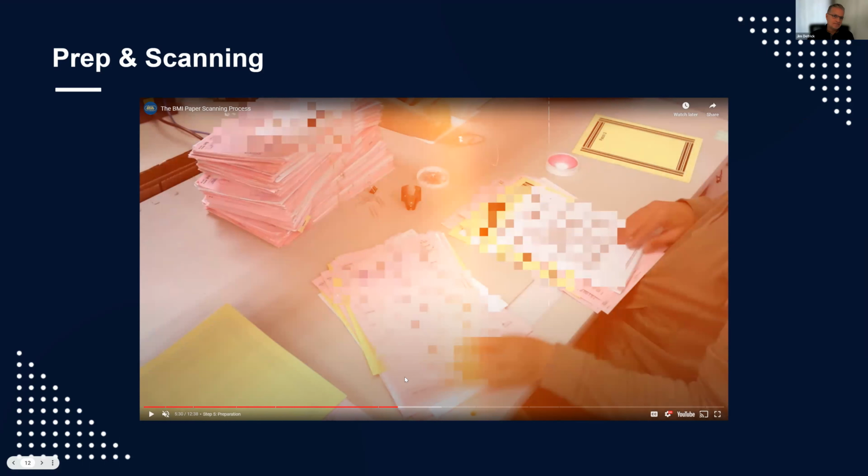No, sir. Okay. Visual is always fun because if you have ever prepped a box of paper, you will understand the pain and why paper scanning can be expensive if it's not clean stuff. And actually, to reduce your own costs, we've had clients do their own prep. That can help, with the caveat that even if you do your own preparation, we still will have to go through and double check. It will just be hopefully drastically reduced from, let's say, it takes us an hour to prep a box to, hey, you already did it. Now it took me 10 minutes because, oh yeah, good. You missed one little thing, that's fine.